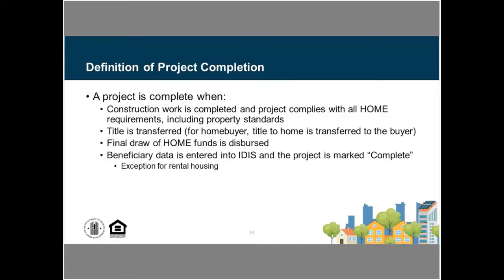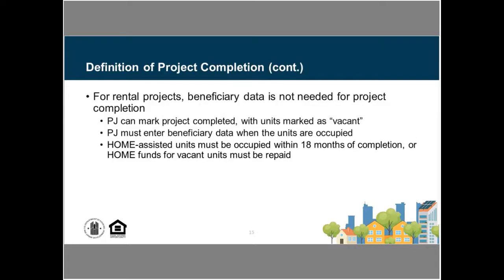As part of our project completion, we also need that beneficiary data to be entered into IDIS. Now we're going to talk on the next slide about rental, which is handled a bit differently. But for our homeowner rehabilitation and our home buyer projects, that beneficiary data is going to be entered into IDIS, and that project will have been marked as complete. That will document that we have completed that project and that we have safely met that 4-year project completion deadline. Let's talk a little bit about the rental exception.